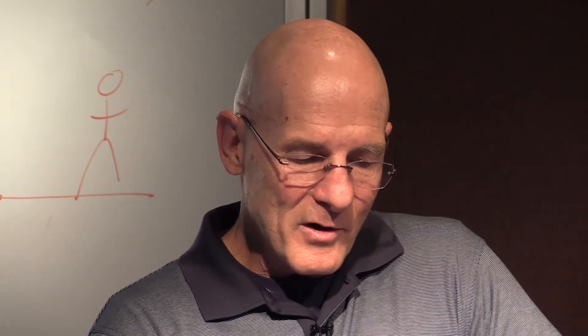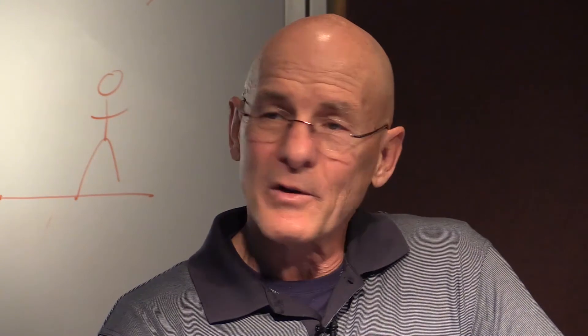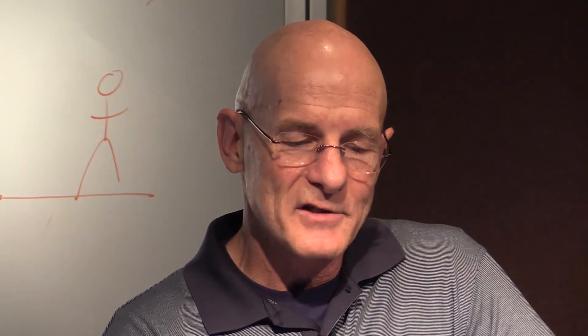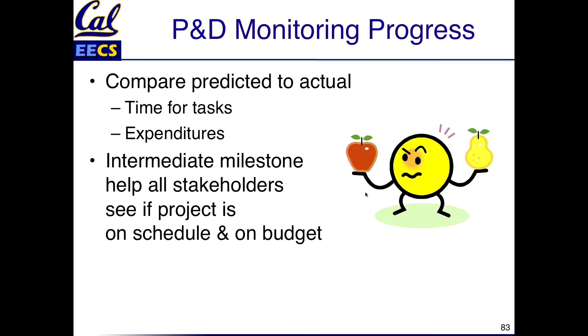Once you've made a PERT chart, what do you do while the project is going? You compare what you predicted to how long things are actually taking — tracking actual expenditures and time against your PERT chart. By sharing these intermediate milestones, everybody is aware of whether you're on budget or on schedule, both the people building it and the customers.